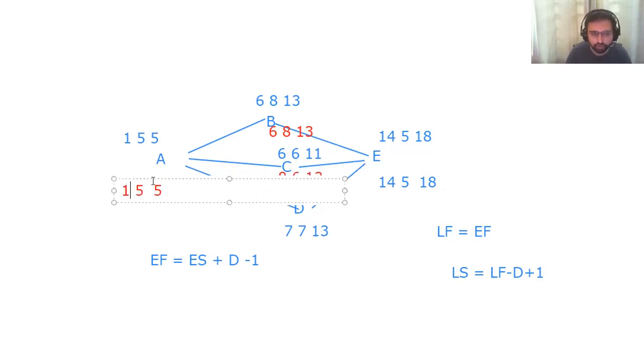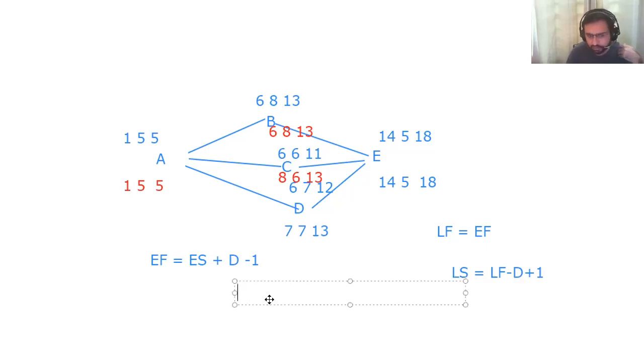If we calculate the float of activity A, it is 0. For float of B is 0. E is 0. So it is proved A, B, E is our critical path. C, 13 minus 11 is equal to 2. The activity C has a float. Path A, C has a float of 2. Then path A, D, E has a float of 1. So this proves that first thing, A, B, E is a critical path, and C and D have a float of 2 and 1 respectively.